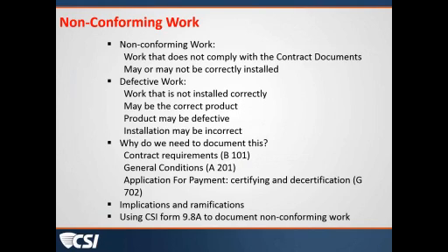I still have to note it, and I'll note that I informed the contractor, who started corrective actions immediately. So it's fulfilling my contract requirements of informing the owner, it's documenting the situation, and it's also letting everyone know that I've got a responsible contractor, he got on it right away.